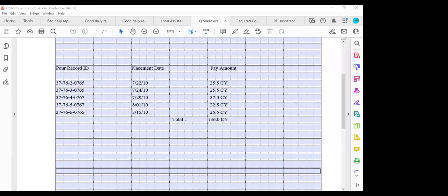In fact, you should start early, before work begins, and start having a conversation with the foreman about what activity he's working, what location he's going to be spending time at, and what equipment he has. So the inspector will be ahead. That way, as the day goes on, the diary follows and you keep on working on it. And I don't think it should take that much time if you follow that route.